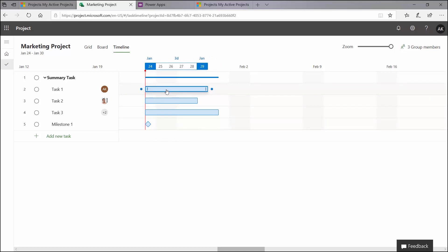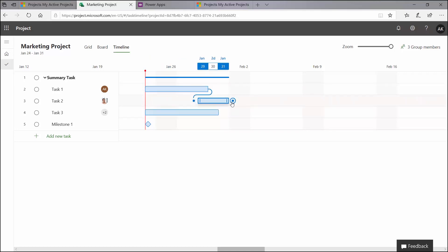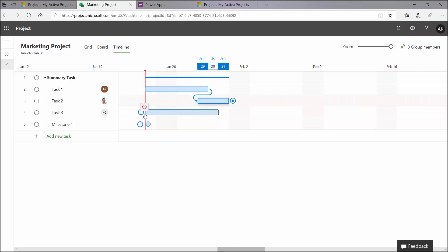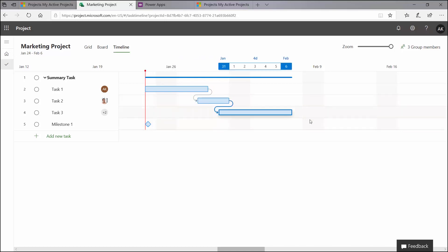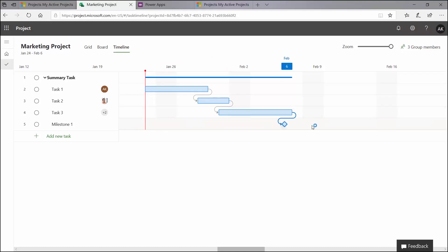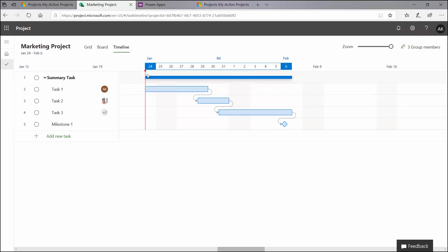So this is the way I found to create dependencies. That's been the easiest is in the timeline view here. And you can see when I hover over a bar for task one, I have a blue dot at the beginning and the end of my schedule. Here is where I can create those relationships. So I'm just going to drag my dot from the end of one to two, from the end of two to three. I have to drag it actually to the dot itself. And then we're going to add it from our task three to the dot for milestone one. And once that happens, it does push out the dates for my summary task. It does take the very beginning of task one all the way through the ending or milestone of my series here.